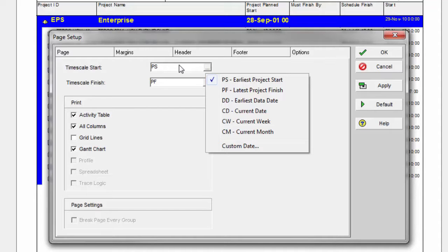But I also need to make sure that my project start is correct, because if it's not correct, you may run into a situation where you run the report, but you have numerous blank pages to the left side of the report on the time distributed part of the report, and that is probably a result of your project plan start date not being correct. I try to keep the project plan start date in sync with when my first set of activities are going to start.